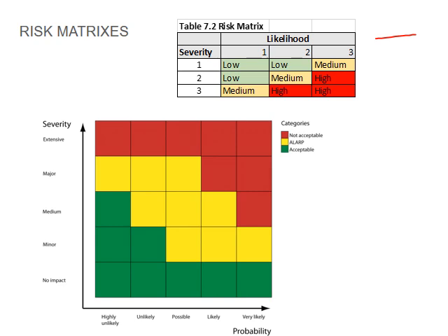So you look at the severity. If it's very deep open trenches that you have, and if someone does fall into it, the injury will be quite bad. The severity will have a high rating, and the likelihood that it might happen might be low, medium, or high. So for instance, if it's in a built-up area, the chances of it actually happening is 2.